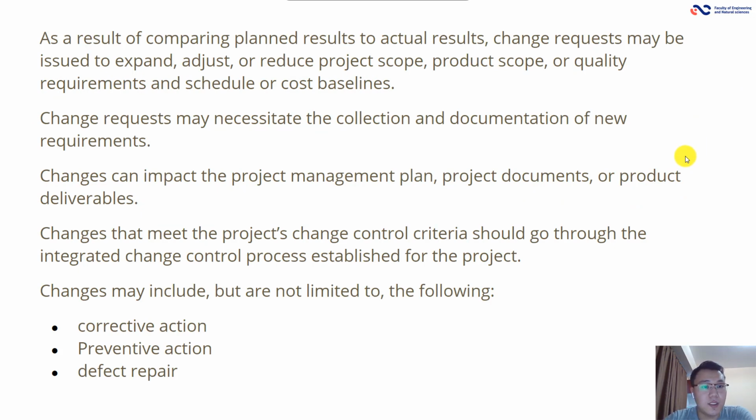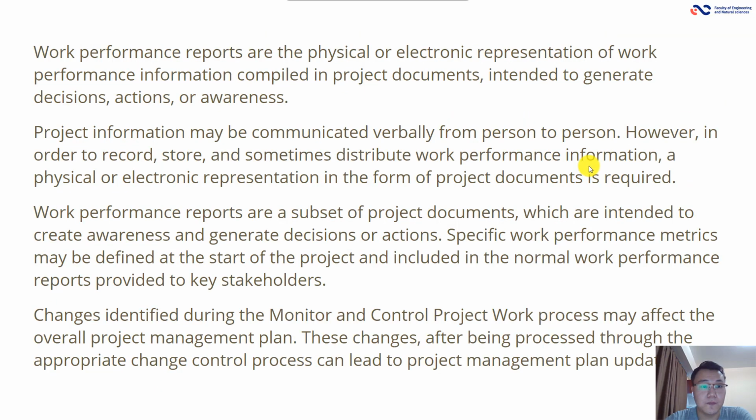Change requests may result in changes that can impact the project management plan, project documents, or product deliverables. Changes that meet the project's change control criteria should go through the integrated change control process established for the project. Change may include corrective action, preventive action, and defect repair.